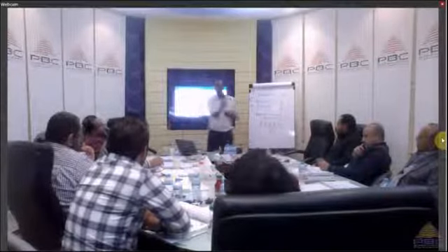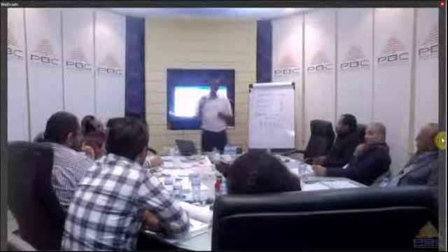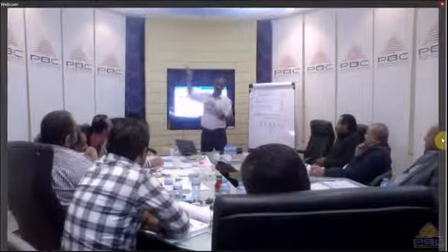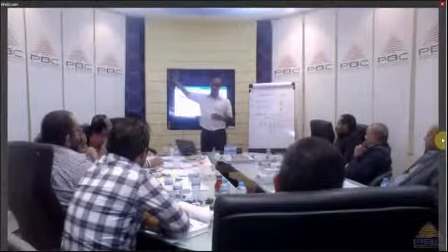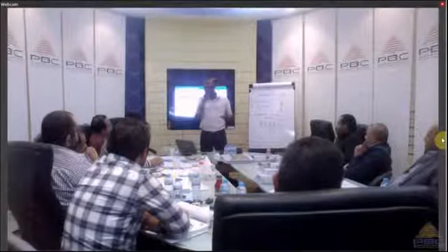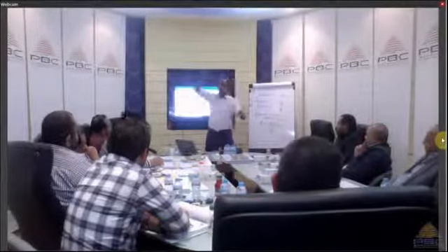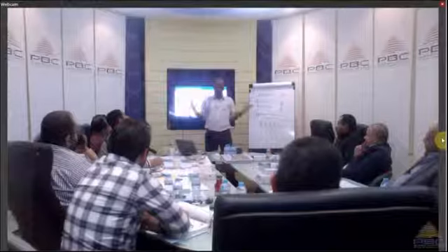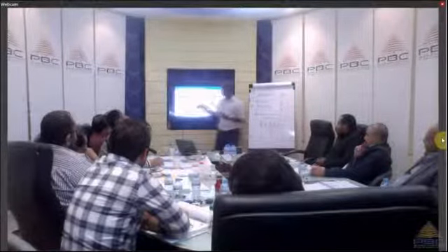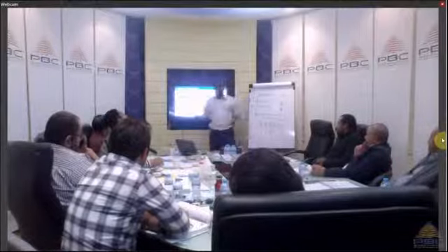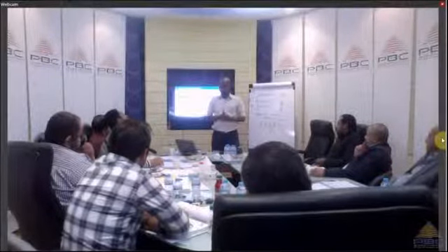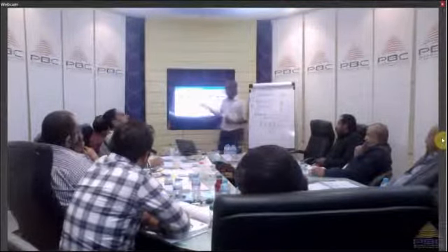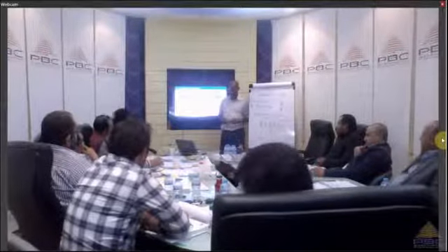So if I know I work in an environment where decisions take longer to make, where money takes longer to arrive, where if you work in a country like Sudan, for example, it takes ages for things to arrive from overseas because of the embargo. So if you want something from Germany, it has to go to China, from China come to Egypt, and from Egypt come to Sudan to break the embargo, for example. So if you work in that environment, your reserve analysis will be different from someone working in Dubai, for example, in a free economy, or in UK, or in Canada, or in US. So this has to be done within the organization policy.